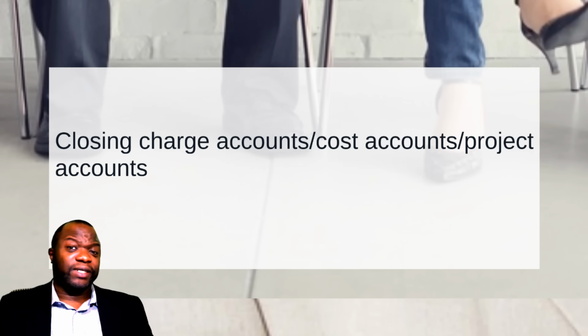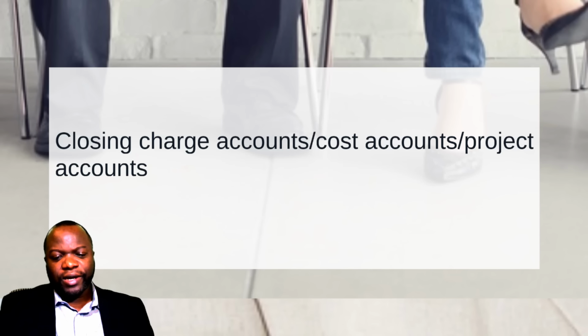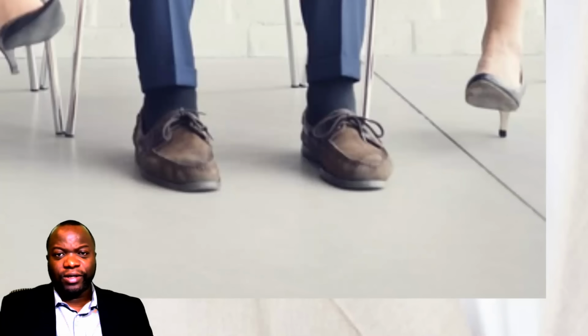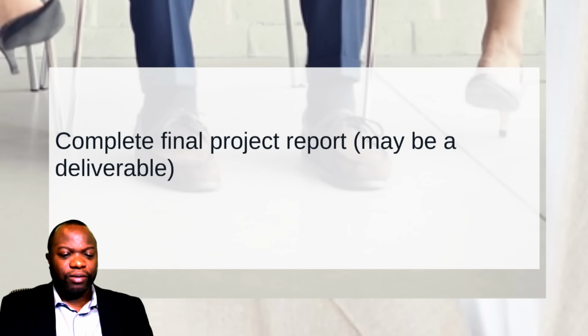Some firms I've worked in, the vendor is coming around months after the project is done to ask for a payment. How on earth are we going to generate that? We thought we were done. So, no thinking, make sure. That's what PMI is trying to say here. Closing charge accounts, cost accounts, project accounts, you want to make sure that stuff is done. Because if it's not done at the right time, it could create problems.